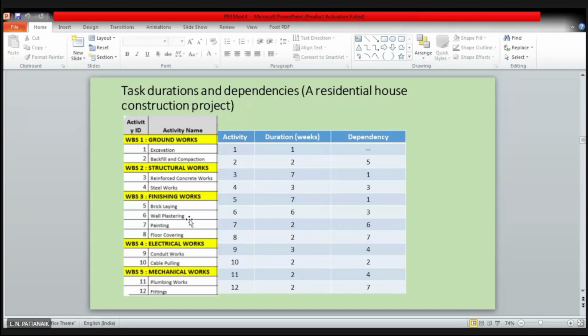After leveling it, you can start the construction of the brick walls, right? Once the brick walls are completed, you are free to fill up the vacant spaces on both sides of your brick wall in the foundation, because there's no need to leave it open.